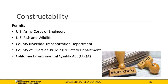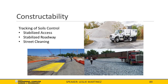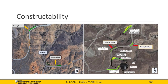For site access during construction, the pre-existing dirt road Cahalco Canyon, located off of Cahalco Road, will be used as a temporary construction road giving access to the bottom of the dam and to the pump station. A stabilized construction access and roadway will minimize tracking of solids and sediment from vehicles leaving the site; street cleaning can be performed if needed. Construction workers can park on the shoulder of Cahalco Road and at the top of the hill on Eagle Canyon Road, with an additional parking site closer to the water tank, providing access to both the top and bottom of the dam and adjacent project areas.